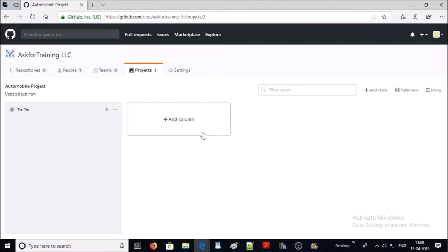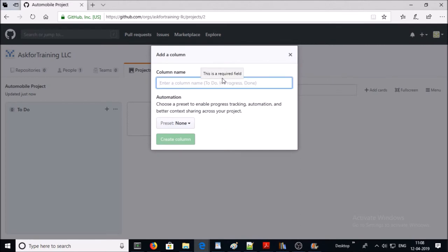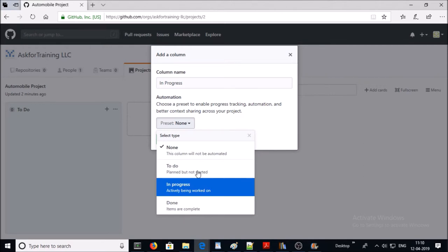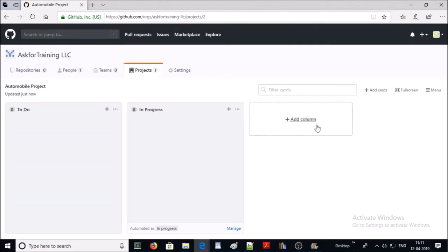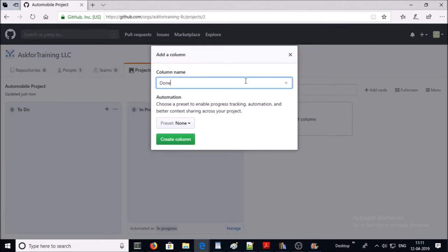Let's add one more column called 'In Progress'. Everything going into this column is actively being worked on but not done or closed. In the automation, select 'In Progress'. For example, I am selecting 'Reopened' — it means that if a closed issue in the project is reopened, it will automatically move to the In Progress column. Click 'Create Column'.